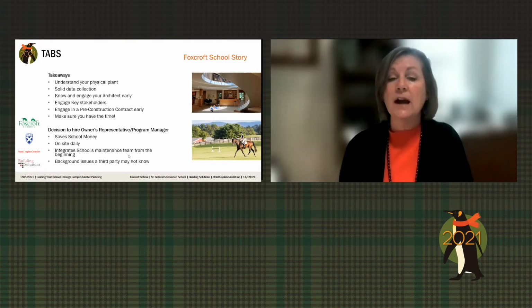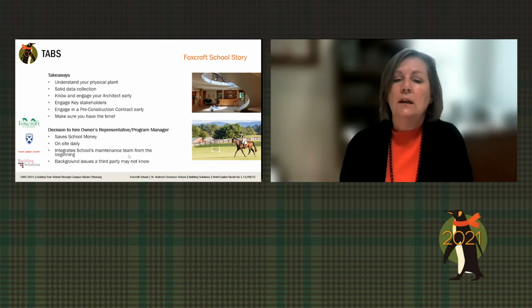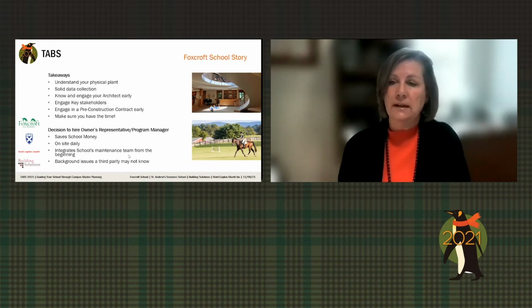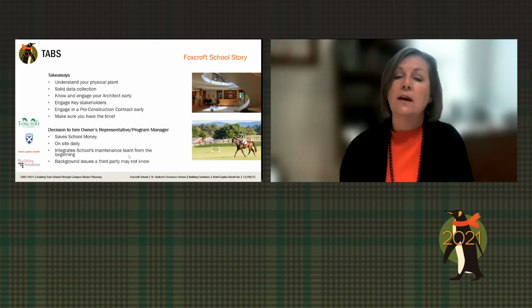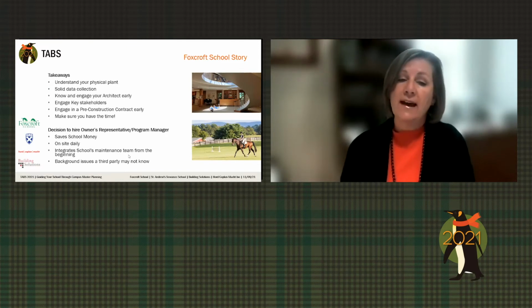I'm on site daily. I see what is happening. So to me, that was a positive to be here, to watch what is happening, to integrate our school maintenance team from the beginning. It's difficult to build a building and then turn it over to the existing staff and say, okay, now it's your baby to take care of. So this helped us decide if I had the right talent to manage a new building or to manage new systems. We have found over time that we have specialty positions in our maintenance department because buildings are becoming more sophisticated.